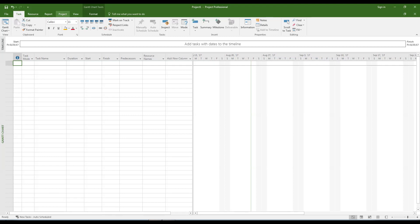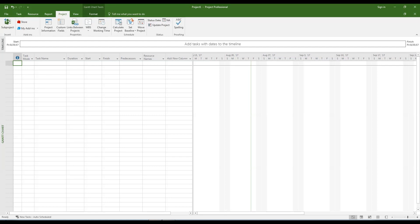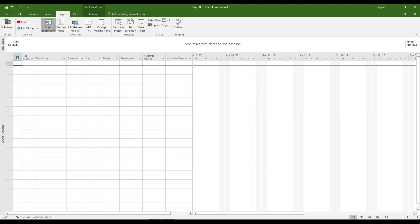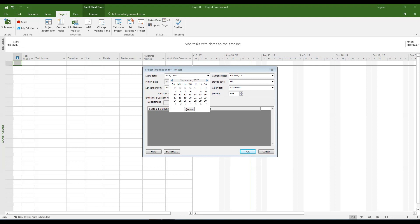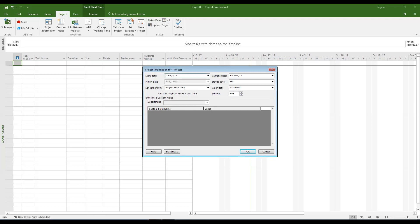Open the project tab at the top of the window. Click the project information icon. Enter the start date for the project. In this example, it is the start of the fall semester. Click the OK button.